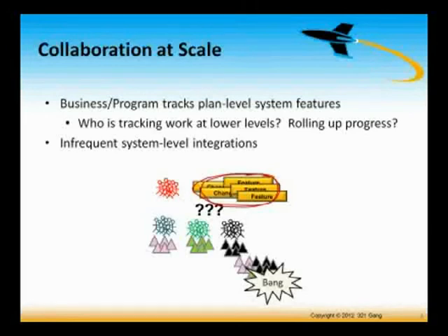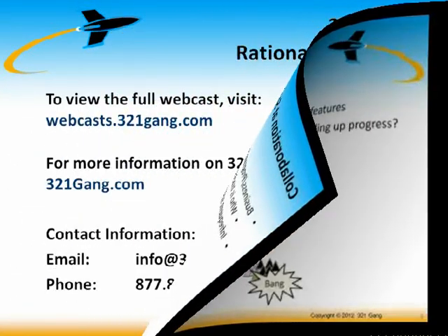Down here we have our team, and then the team actually might be composed of teams. So this work gets assigned to a team, and maybe that's again very large programs. So you're going to have teams of teams, and maybe those teams are broken up into teams. And how we report status back up, well, that's what the big question mark represents here, right? How does status get rolled up to say, are we making progress towards this thing? Well, down here, this team lead's going to report up to maybe his subsystem lead, and the subsystem lead reports up to a segment lead, and the segment lead then reports up to the program. And it's all really verbal communication and verbal reporting. In fact, I give talks like this on scaling agile practices frequently.